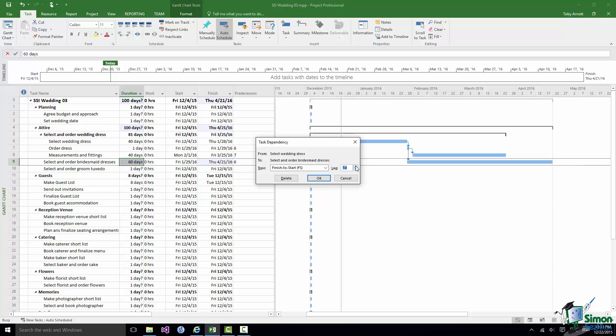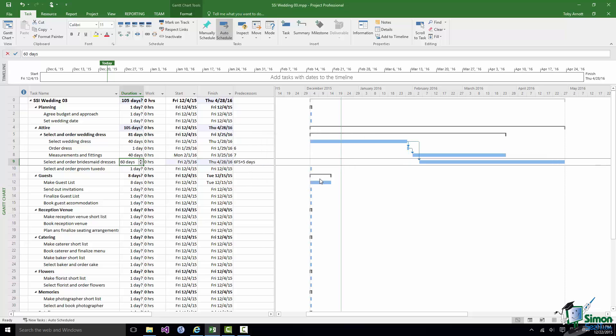And if I then click on that as my dependency what you'll see is a five day gap. Effectively we finish Select Wedding Dress then there's a five day gap and then we select in order Bridesmaid Dresses. So that's a lag.